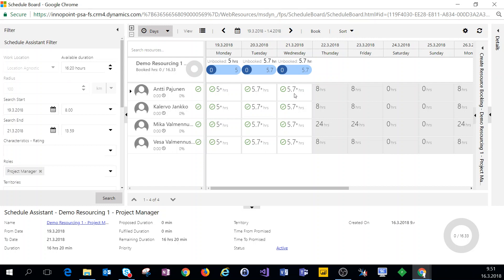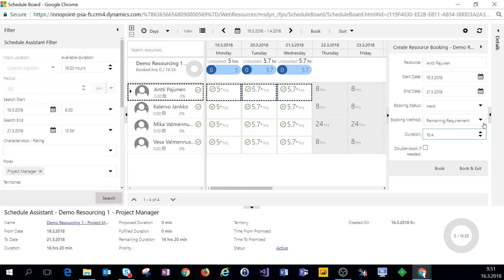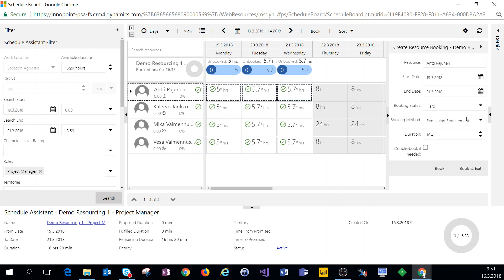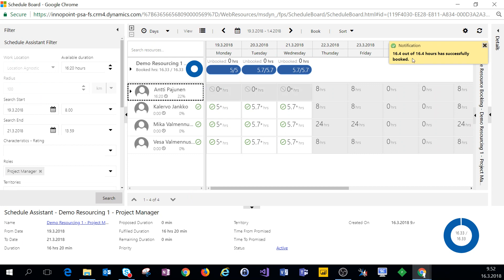I'll select myself and select all three dates. As a booking status I'll choose Hard. I could also choose Soft Book if I want to soft-book myself for this task. As a booking method I'll choose Remaining Requirement — I could also do Full Requirement. Once everything seems in order, I'll click Book. We'll get a notification that 16.4 hours out of 16.4 hours have successfully booked.